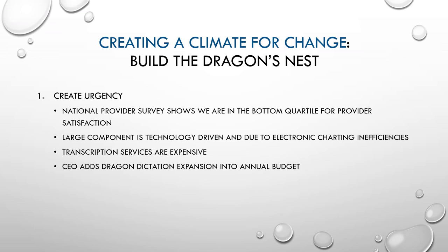We created a sense of urgency because we had a provider survey that went out, and our providers were very dissatisfied. A lot of that was driven by the EHR. I'm sure you have the same problems at your institutions. And we are under a lot of fiscal pressure to improve our profits, and transcription services are really expensive. They're actually much more expensive than Dragon dictation. And then finally, the CEO, because of all the above reasons, put this into the budget. And that definitely creates a sense of urgency, right? It's in the budget. We're going to do it. We have the money finally.